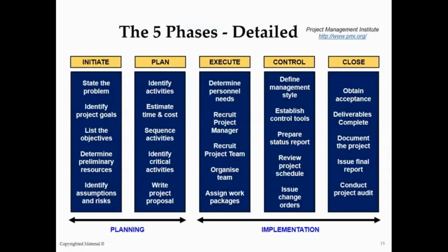Now, this is not a new slide for any of you. This comes directly from the Project Management Institute, basically the five phases of the project. The ones that are most important for the sponsor to be involved with are initiation and planning. Now, certainly implementation, execution, control, closure. As I said, I've got slides in here that describe the ongoing role of the sponsor, but it is absolutely vital that the sponsor be involved and take ownership of the initiation and planning phases of the project.